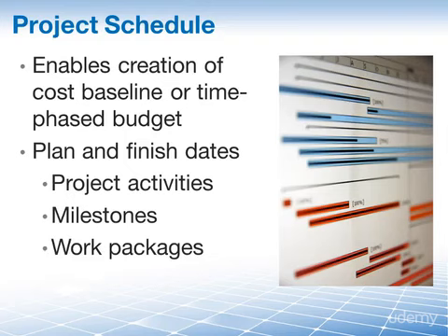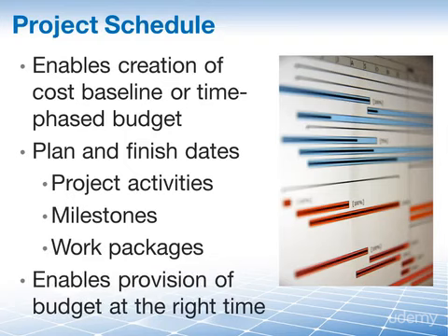The project schedule enables the provision of the budget at the right time. In other words, if you know from the schedule that the work will happen in July and you have estimated that it will cost $4,000, well, you have to add $4,000 to the budget in July.